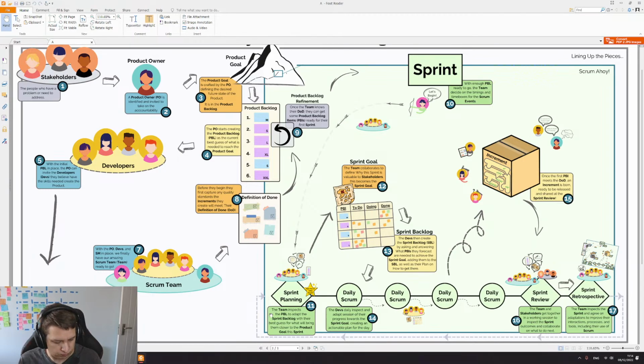Now, who does this? Well, it's the developers. The developers are the ones who own the sprint backlog, right? The sprint goal is the commitment for the developers for the sprint, which is agreed together as a Scrum team. But once that is agreed as a Scrum team, the developers create the rest of the sprint backlog, so the items that go within the sprint backlog to achieve the sprint goal. And then they may also create a plan by breaking it down further into tasks or something like that for how they're going to achieve that work within the sprint.